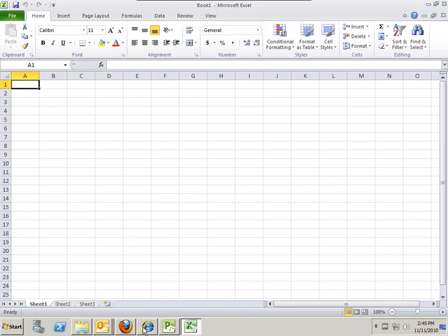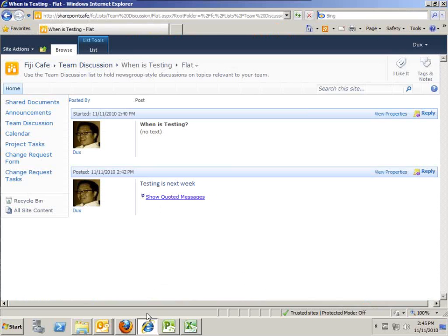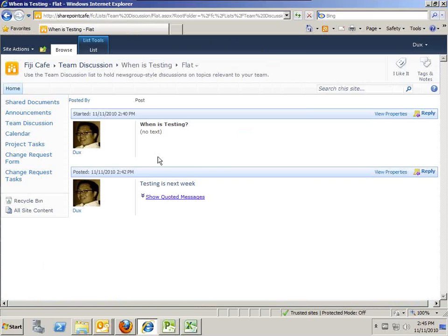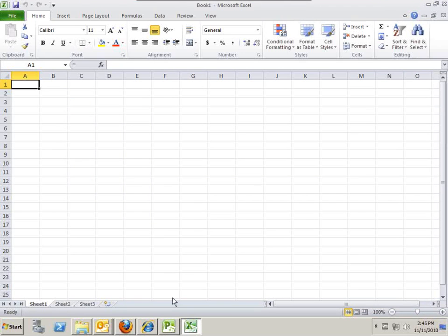I said, okay, since we just rolled out SharePoint for you, and every project has a project site, what we're going to do is have the project managers enter their expenses in the project site, not in Excel. They're not going to email you Excel. And once they enter their expenses, it's just going to show up in your copy of Excel. You don't even have to go anywhere. It'll just show up here, right? And she goes, okay, that'd be great.